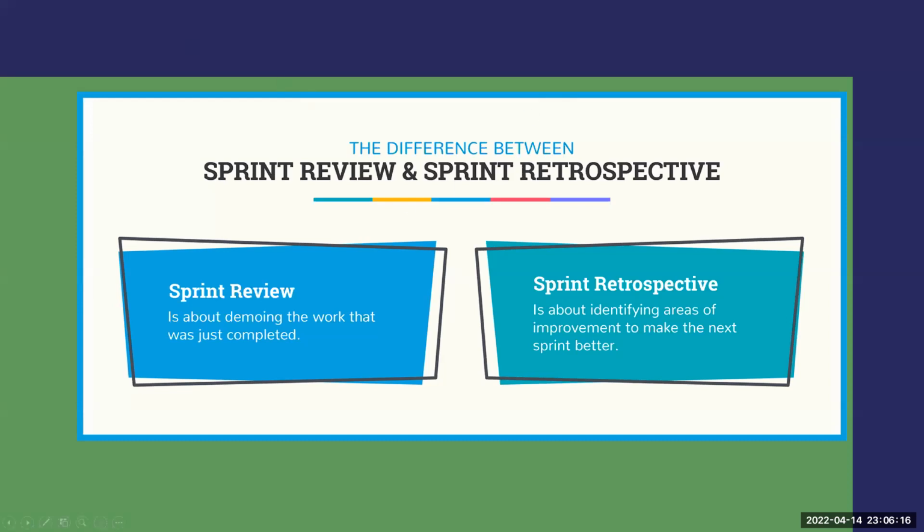Rodolfo? Yeah, I was going to ask if the daily Scrum can start without the Scrum Master, or it could be without him? Yeah, you do not need the Scrum Master at the daily Scrum. That's just for the development team. Good question. Any other questions on this?